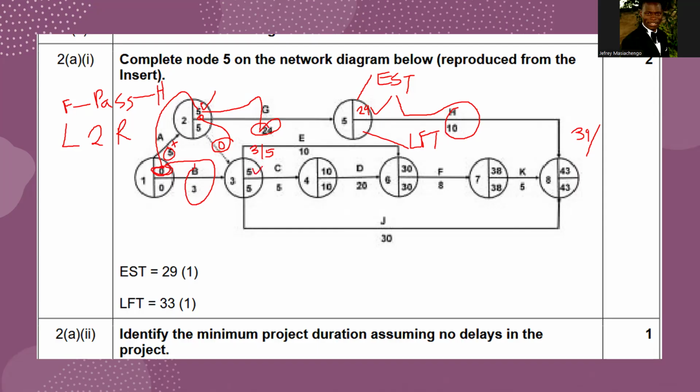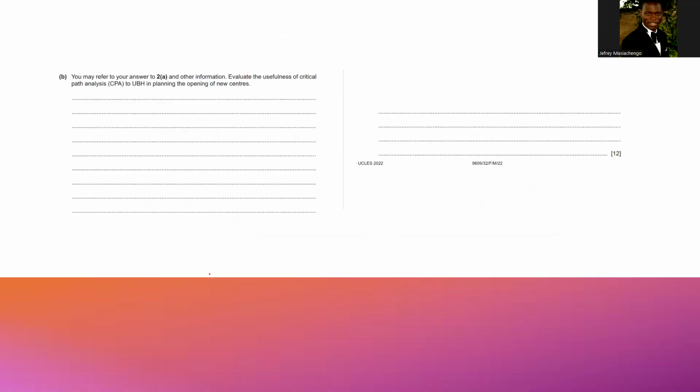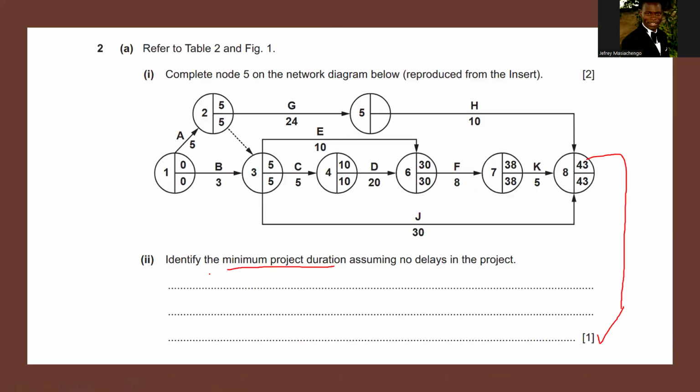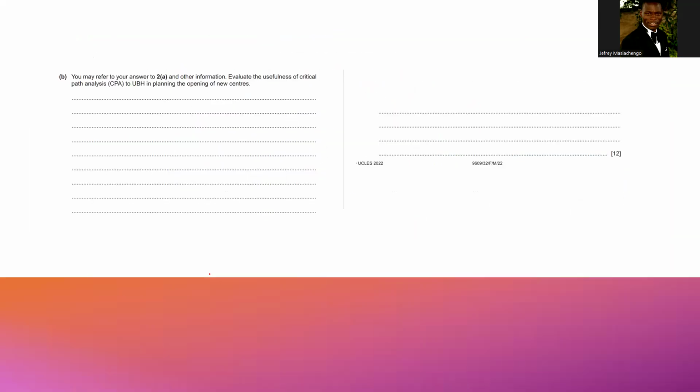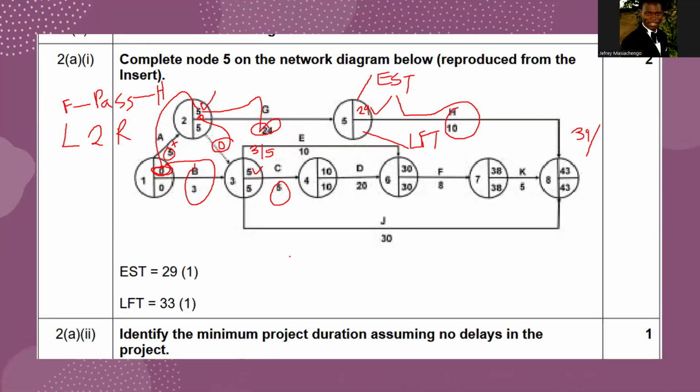Excellent. Let's continue with the forward pass. We are saying 5 plus C. In this case, it seems this is 5. I'm sorry, it's not very clear, but we can check. I think it's a 5, okay? You can actually see that this is a 5. So 5 plus 5, what do we get? We get 10, okay? So you'd say 10, we are doing a forward pass. 10 plus 20, what do you get? You get 30. You are slightly happy now.